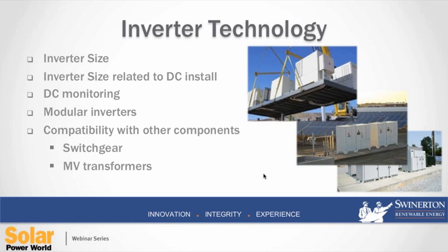And then finally, looking at compatibility with some of our other components, as we procure just about every component on the site. We look at the ease of installation, not just for ourselves, but how we partner with our transformer vendors, with our switchgear vendors, how it conforms to the SCADA system that is being used on the site. So all those pieces go into our decision-making process as the EPC when looking at just bidding a job.